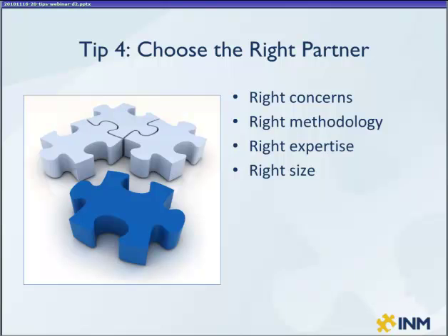And finally, one of the things to consider too is the size of your partner's enterprise. Look for an organization that has the right mix of expertise. Working with a team that has dedicated roles and resources means that you have access to specialists in each area. So the right size team for a web redesign project, for example, should include resources for project management, design, user experience, development or integration, testing, and marketing and communications.